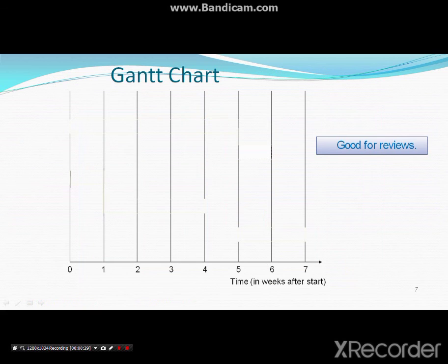So similarly, if I go step by step for drawing a bar chart, let's say the example of a house, then the first activity is your excavation. Okay, the first activity is the excavation and foundation. So let's say it takes almost 3 months to do the activity. So after excavation, the activity that can be done is wall construction.